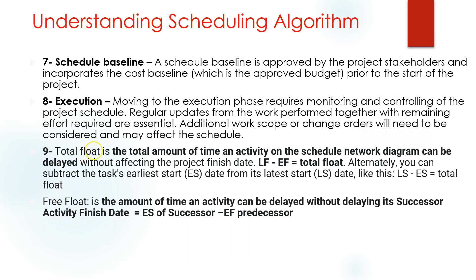Total float is the amount of time an activity can be delayed without delaying the project. It is equal to the difference between late finish and early finish, or late start minus early start. Don't be confused — it is the difference between either late and early finish, or late and early start.